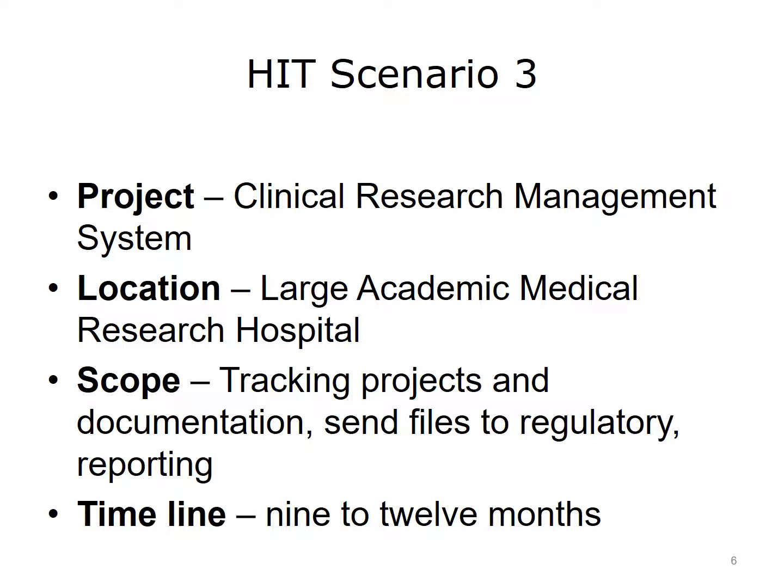Although this may seem like a fairly straightforward IT project, you'll need to consider the users, that is, the principal investigators, the research staff, the clinical staff, and the administrative staff. So your team would include representatives from each of these stakeholders to make sure the system is built in a way that's useful to them. Note that a CRMS is such a specialized product that there are probably very few vendors that can develop it or customize one for your needs. So finding the right vendor will require a bit of research and interviewing. Ideally, it would take anywhere from 9 to 12 months to implement a system like this, in the case of a commercial solution. Longer if you decide to "build" on your own.